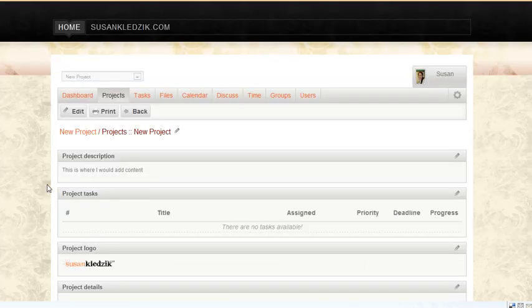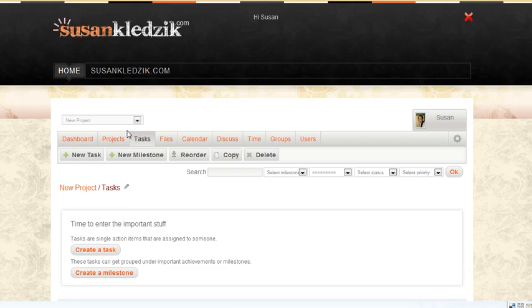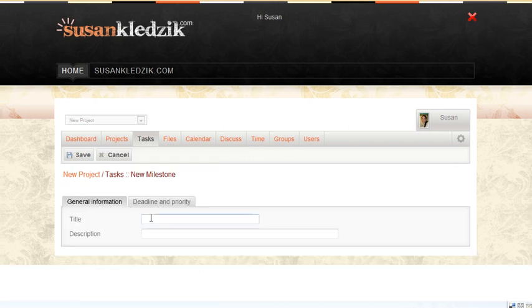And the next thing I want to do is start adding tasks to the project. So my first task is I'd like to do some logo editing. So if I go here into tasks, I can create a new milestone, or I can create a new task. What a milestone will do is if I have a couple tasks within a certain category, I can categorize those tasks by creating a milestone. So I'll go ahead and create a milestone, and this particular one is just logo editing.